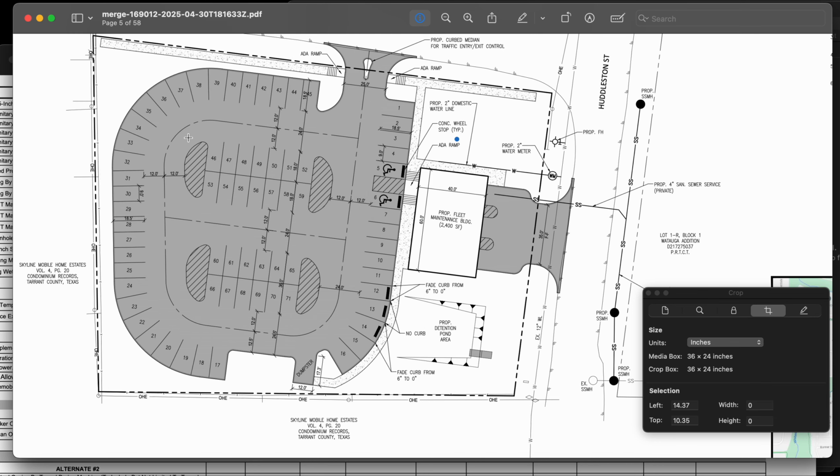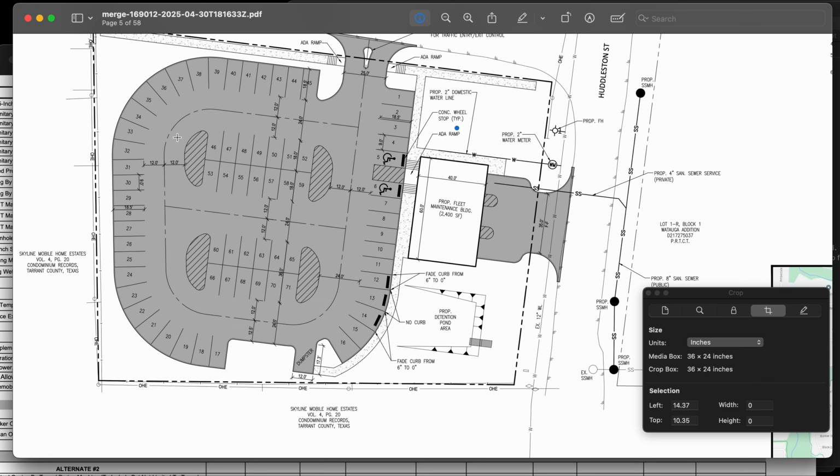The pavement prep, if we're putting flex space in, I like to be at about $5 a square yard. So 5 times 4 is 20,000 for the prep of the pavement. Then I'm going to up it to $6 for the final grading, whenever we put the flex space in. So 6 times 4 is 24,000 for the final grading.